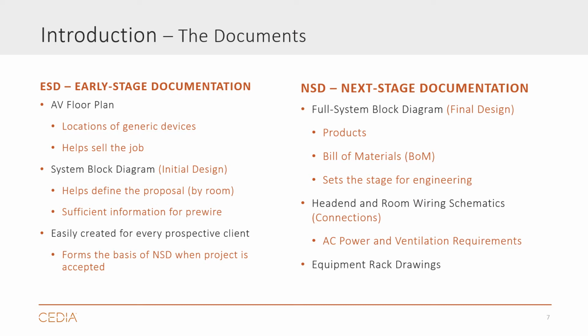Early stage documents are relatively easy to create since exact product models aren't necessarily decided yet, and generic shapes and symbols can be used to create the design. ESD is used to help sell the job, define the proposal, and helps launch NSD when the project is accepted.